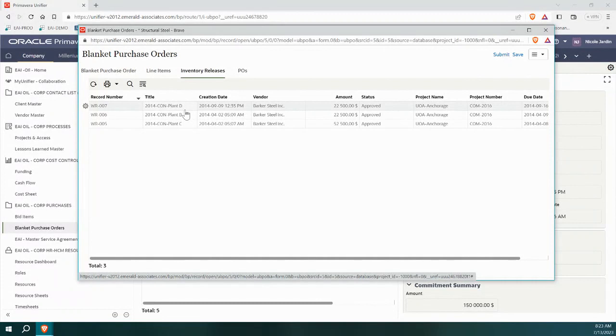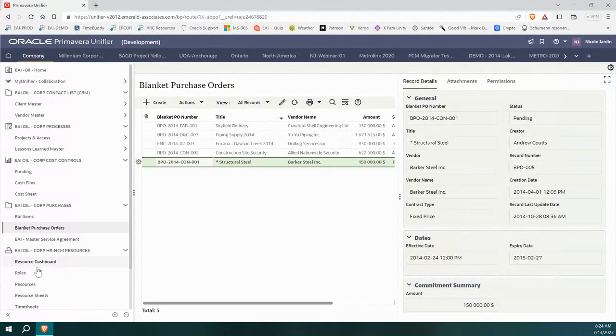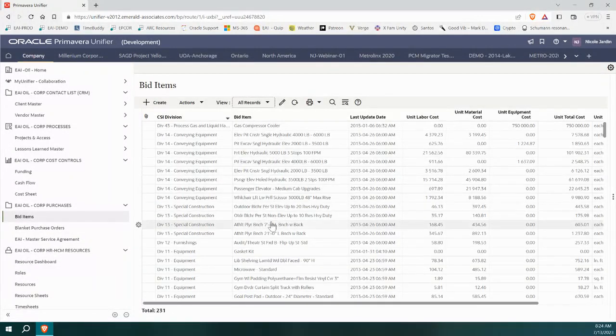Many of our clients, again, depending on their function, especially if they're an owner type business, they may do long lead items that they purchase in bulk, and then they divvy them out to the facilities. Okay, so this allows us to do that. Another thing that you may do at the corporate level is you may want to have a list of standard items that you want to have a fixed rate, a fixed purchasing agreement with your vendors, and then those can be purchased into the project.